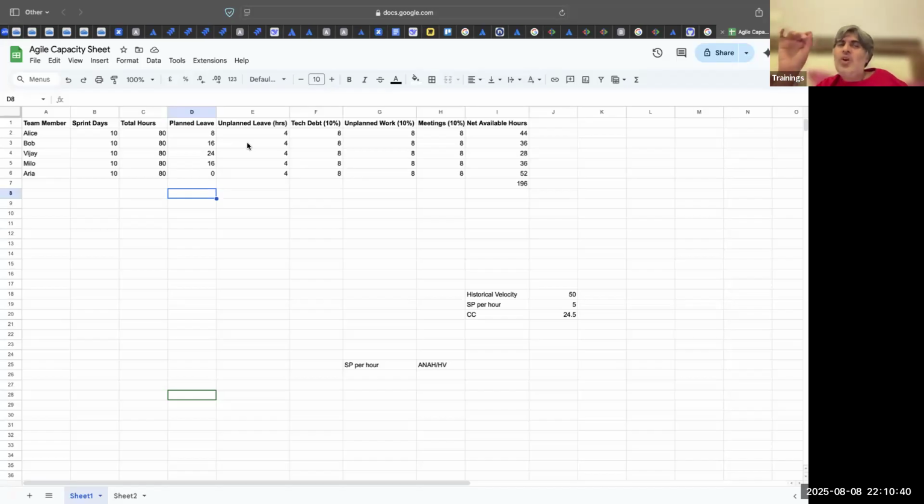So you can say, okay, 0.5 per head is my unplanned leave. Or let us say in the last month you had 5 unplanned leaves for 5 people. So 1 unplanned leave per resource. So based on your previous data, you can take it, but typically if there is no data available, we take 0.5